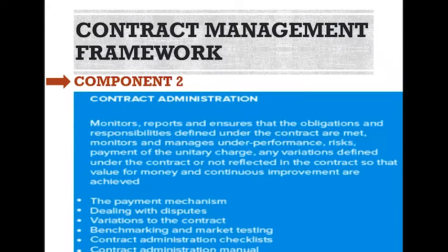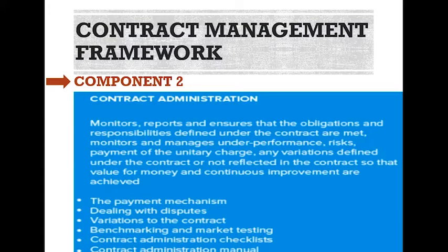Component 2: Contract administration. This monitors, reports, and ensures that the obligations and responsibilities defined under the contract are met. It monitors and manages underperformance, risk, payment of the unitary charge, and any variations defined under the contract, so that value for money and continuous improvement are achieved. This includes the payment mechanisms, dealing with disputes, variations to the contract, benchmarking and market testing, a contract administration checklist, and a contract administration manual.